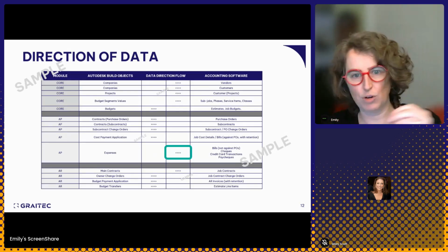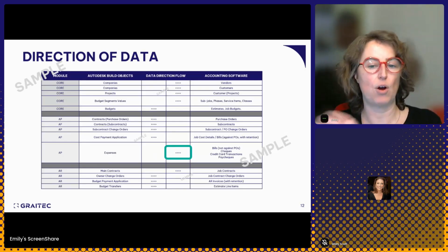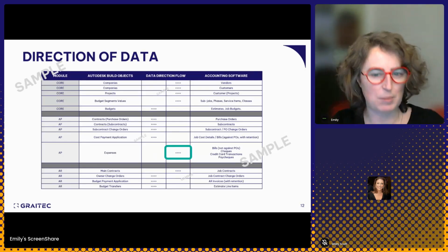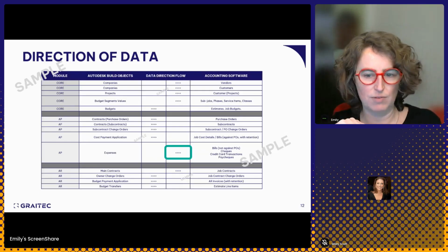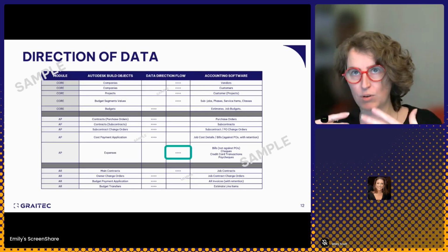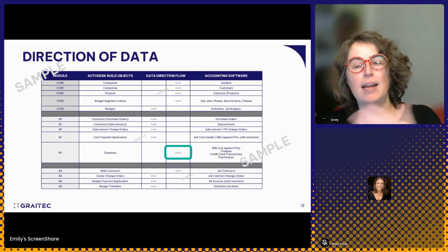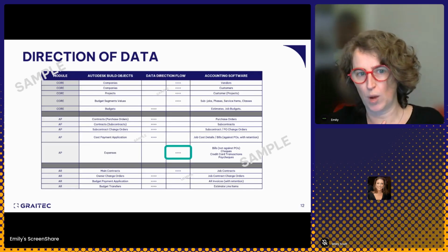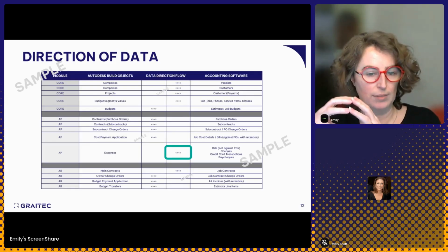And if you want, you can publish that out to the system, and those savings then are available for other people who are viewing the budget. You can also keep them and stash them away secret scroll style for when you need to, oh gosh, I'm spending more on this other budget line. Hey, look, my surplus from this one is actually going to help me feed that other overrun.